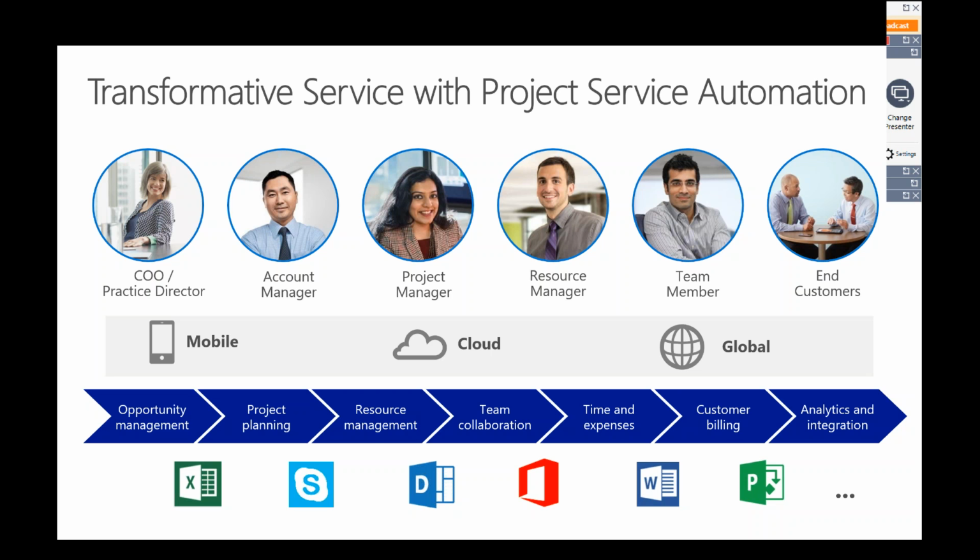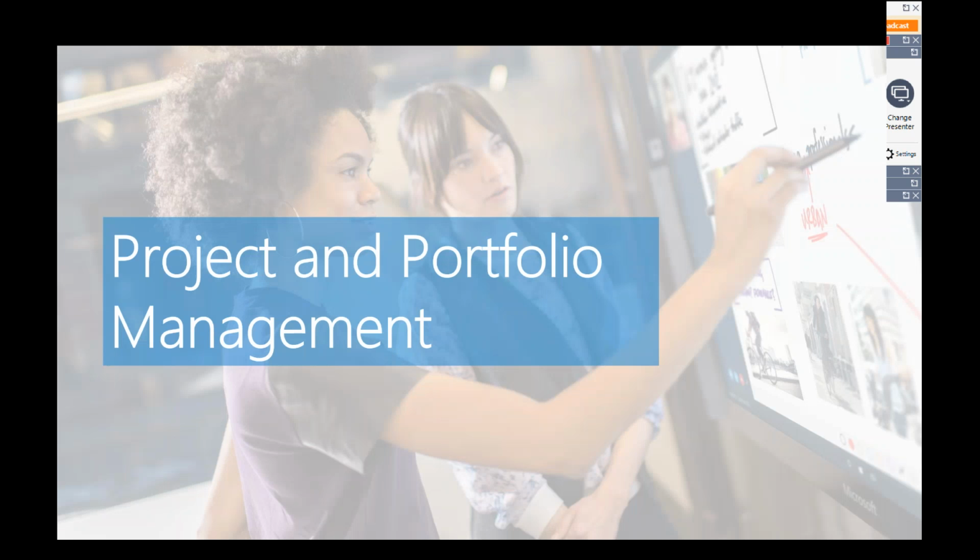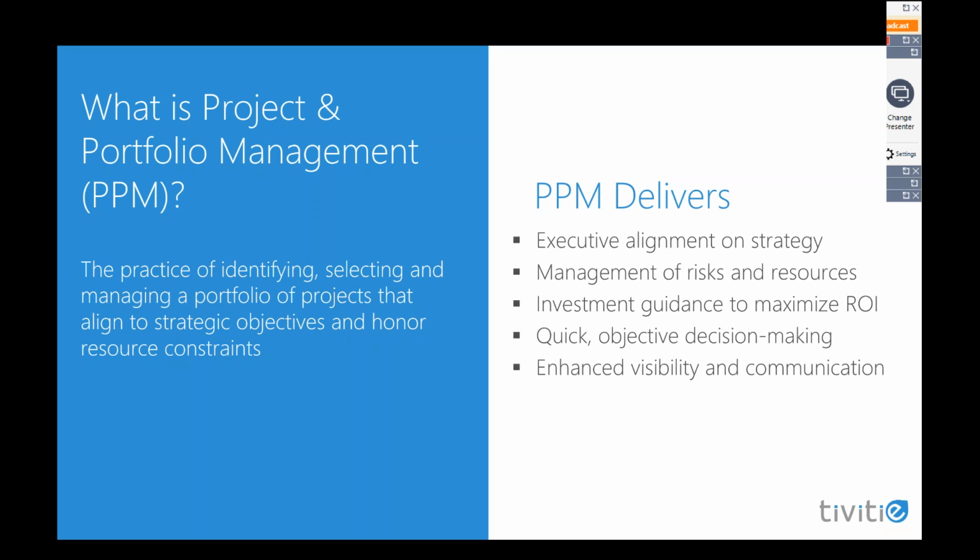And it doesn't really just stop there. You can look at this just as a true professional services project solution, but we can also extend this to project and portfolio management for other types of projects and work, whether it be IT or other aspects of the business. So where is project and portfolio management, or PPM, different than PSA? Well, at the high level, it's the practices of identifying, selecting, and managing a portfolio of projects that aligns to strategic objectives and that honors your ability to deliver resources to those projects.